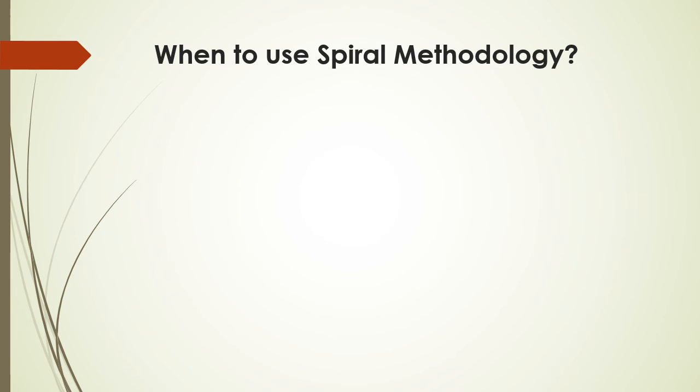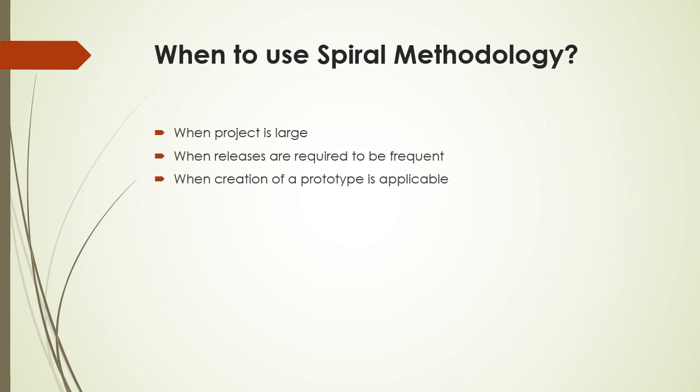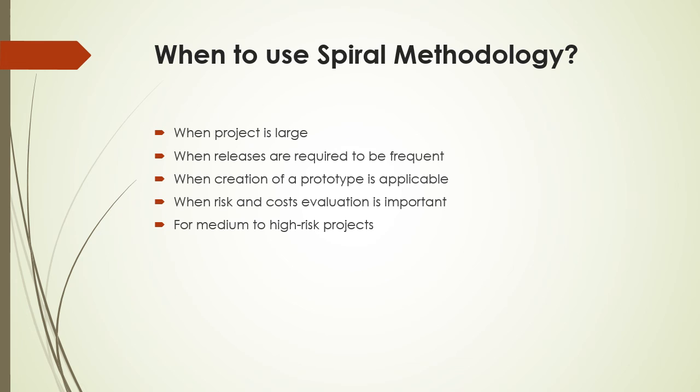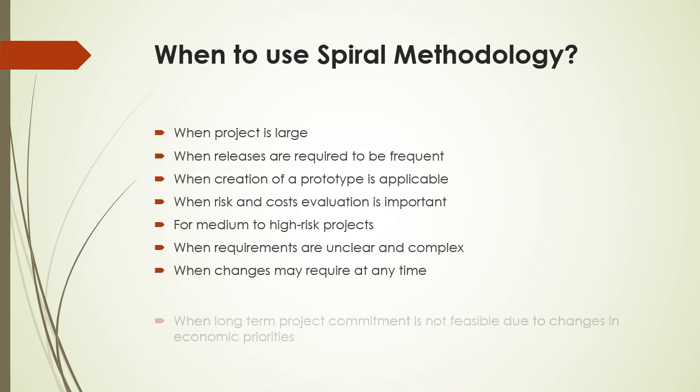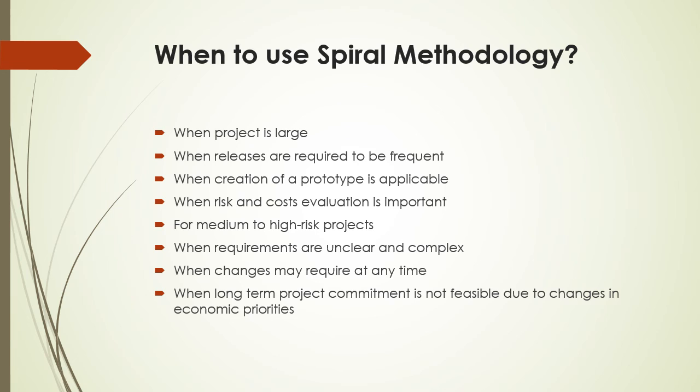When to use the spiral methodology? When the project is large, when releases are required to be frequent, when creation of a prototype is applicable, when risk and cost evaluation is important for medium to high risk projects, when requirements are unclear and complex, and when changes may be required at any time. Also, when long-term project commitment is not feasible due to changes in economic priorities.